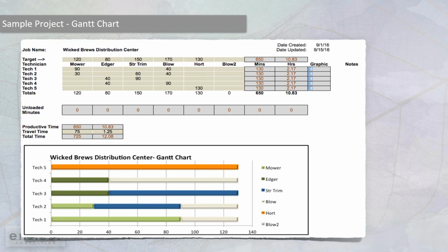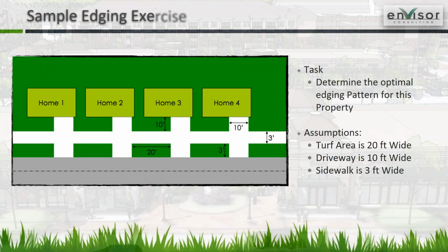and it gives you a lot of power in understanding what kind of equipment I really need, how many mowers, how many skid steers, whatever I need, how many people. Sometimes more people is not more productive, and the Gantt chart will clearly show that when you begin to organize it. It's a great tool if you can develop some competency there for planning and for eliminating waste in the process.